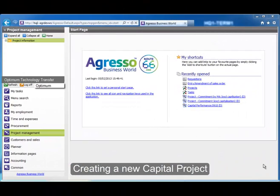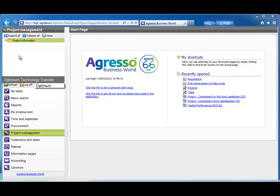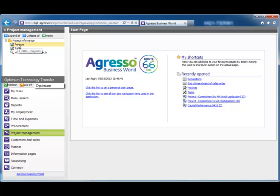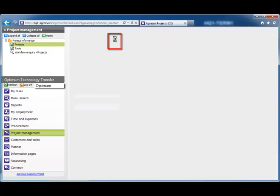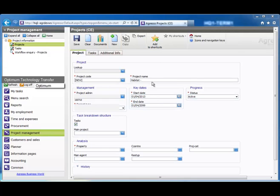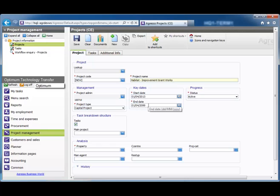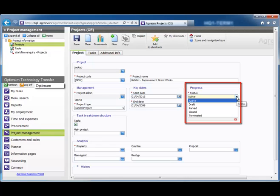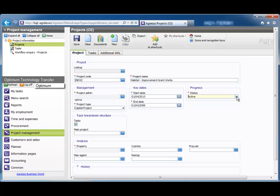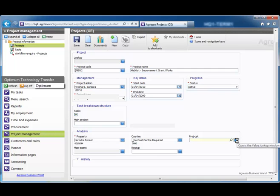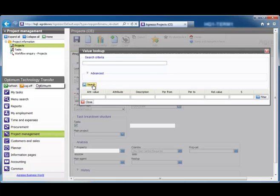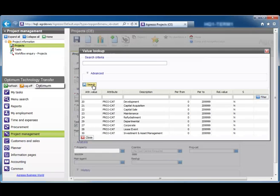We will now look at the new changes when creating a new capital project. Select Project Management, Project Information, and Project from the navigation menu. The first change is that you will need to click on the New button in the project menu. The second change relates to the project status — the status 'Waiting for transfer' no longer exists in Agresso. All projects that are to be pushed into the workflow should maintain the status of Active; this will be the default. The Project Category field is responsible for the tasks that your project will initially have. Select using the value lookup a particular category — in this case I will choose Maintenance.